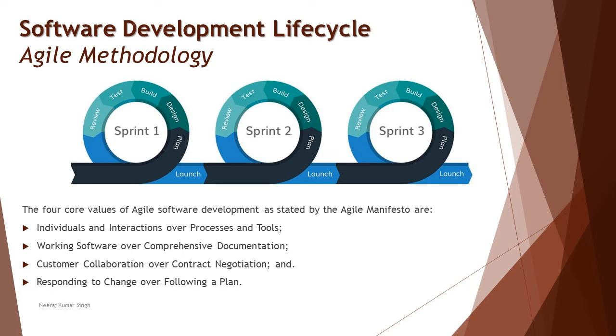So we select certain work items for a particular sprint here. That is what you call planning the sprint. Then you start with the designing activity, implementation of it, test the same thing, and then review. Have you implemented what you were supposed to implement or not, as per the plan? The acceptance will be done by the PO here to take care of that. Again, to talk about the very detailed things, we will have separate Agile sessions down the line. But right now, we're just introducing you to Agile methodology.